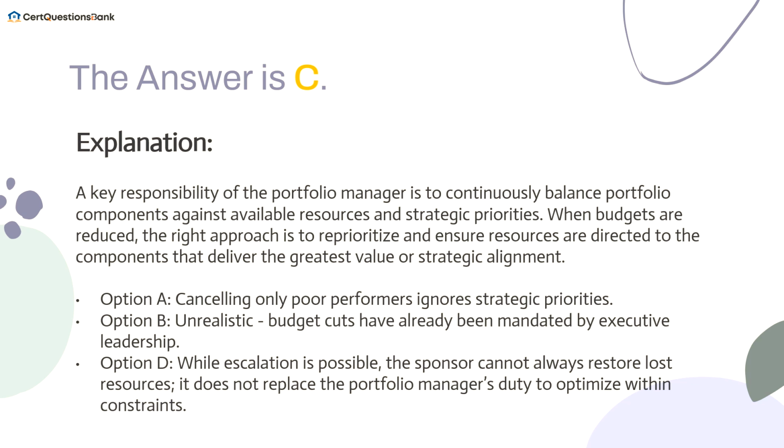The answer is C. A key responsibility of the portfolio manager is to continuously balance portfolio components against available resources and strategic priorities. When budgets are reduced, the right approach is to reprioritize and ensure resources are directed to the components that deliver the greatest value or strategic alignment.